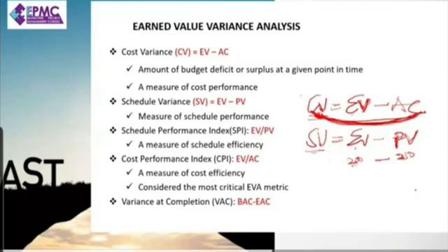You are earning less than what you planned. You are completing less than what you planned. That makes it quite easy. You are completing less than what you planned to do. So this would be minus 50, means there's a problem. So when your variance is negative, it means there's a problem. When it's positive, it's good. Negative, nobody likes it. We all want positive, isn't it? So when it's negative, it's bad. When it's positive, it's good.